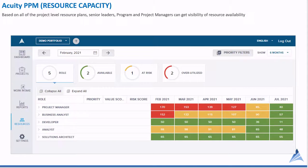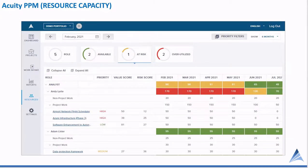This is an example with a common heat map showing teams that are overutilized on average. At the top, we can see how many teams have available time, are at-risk, or overutilized. We can further prioritize this work or remove lower-priority projects and see how that affects resource capacity. This last chart shows the details underneath — we can see individuals, how much project work they're doing versus non-project work, the relative priority, and if you're using the prioritization module, the relative value score and risk score. This information comes together to help inform whether projects should be de-scoped, put on hold, etc.